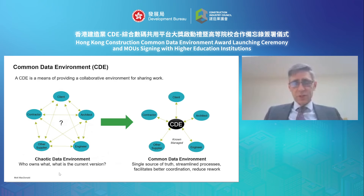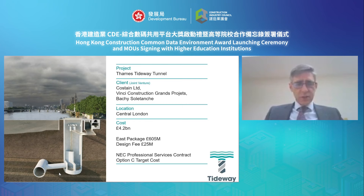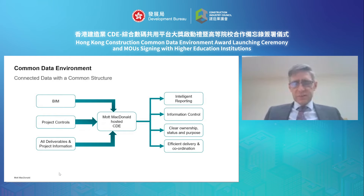A really good example of this is from the work we did on Tideway. Thames Tideway is a huge project in London helping to clean up the River Thames — about £4.2 billion worth of investment with many different organisations working on the project. The connected data environment here shows MacDonald hosting the CDE, coordinating BIM and project controls, deliverables and project information. The value of this is that it provides intelligent reporting, information control, clear ownership, and most importantly, efficient delivery and coordination — delivering real significant savings.